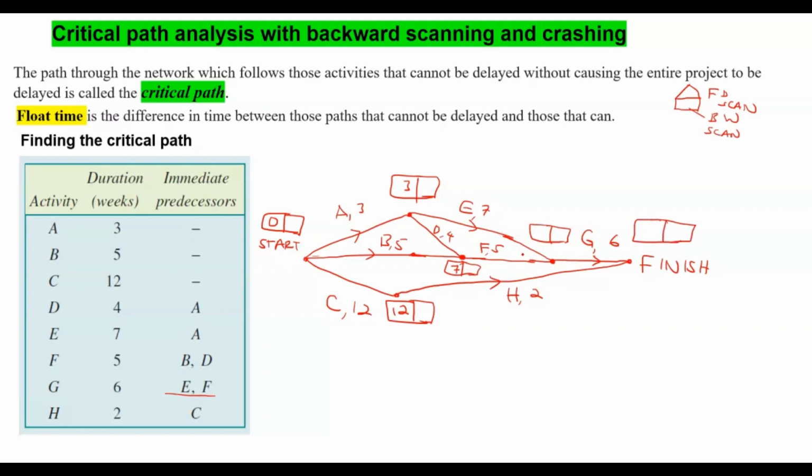Okay, now, because this node has got 2 ways, you could come this way, or you can come that. So again, we already picked the biggest number. That means 7 was our biggest number coming this way. So 7 plus 5 is 12, while 3 plus 7 is 10. So your 12 is bigger than 10. So you put 12 there.